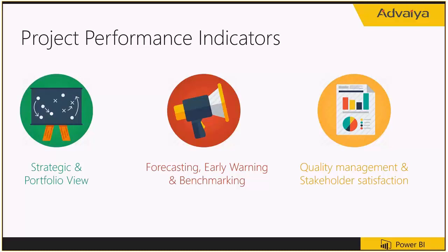Yeah, exactly. And at the operational level, live tracking of various project parameters allows forecasting, early warning, and benchmarking. These indicators are very important in effective project execution. Examples of such indicators are schedule status, work forecast, resource needs forecast, various variances, risk levels, etc. So these indicators use the current project data as compared to schedule and budget as well as information about known plan events. Correctness of information is key to effective use of these indicators.